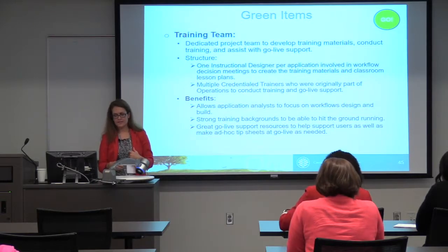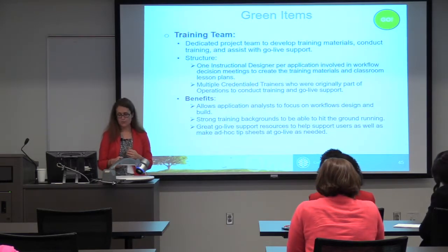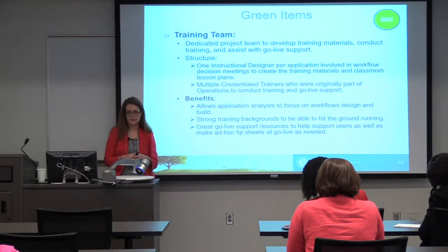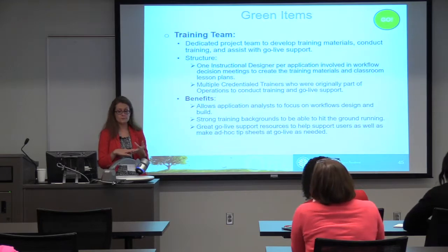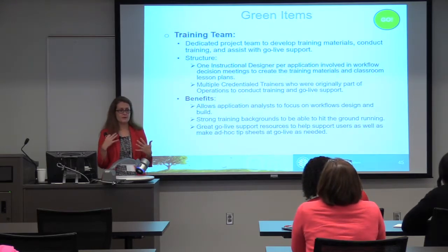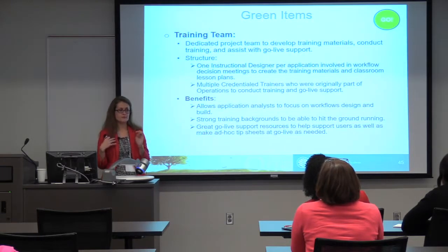All right, my next green item is our training team. We had a dedicated training team, and they were responsible for developing the training materials, conducting training, and then they also helped assist with go live support. The structure of our training team was one instructional designer for each module, so we had 4, and that was for Reg, Sketch, Hospital Billing, and Professional Billing.